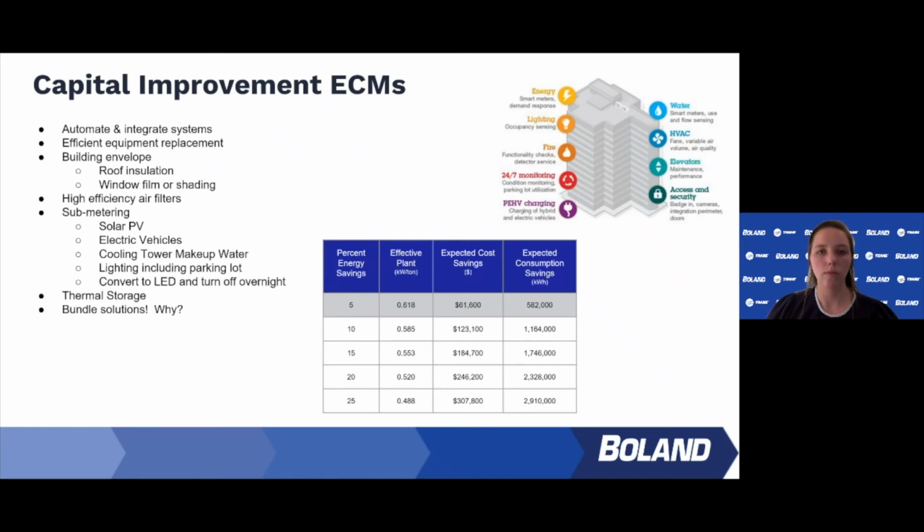Also, for utility incentive money, which we'll talk about in a few minutes, there's incentive money that can go towards making some of those operational changes, but you have to enter into the incentive agreement first. So before you make any changes, make sure to check with your friends at ICF, or whoever your utility incentive provider is. We'll talk about that more in a minute.